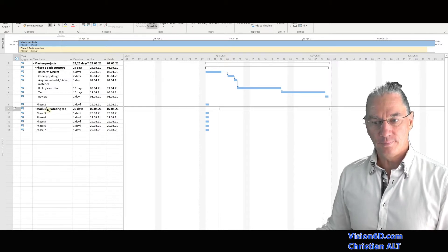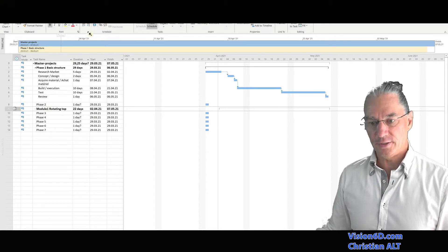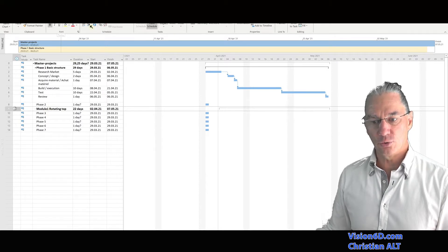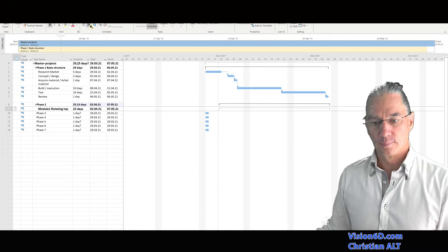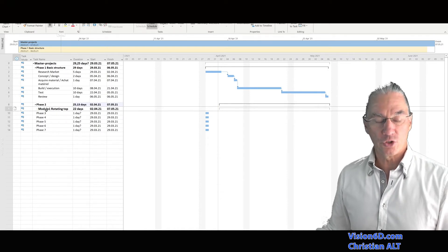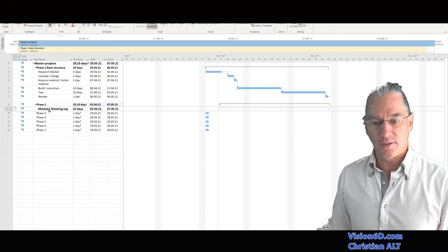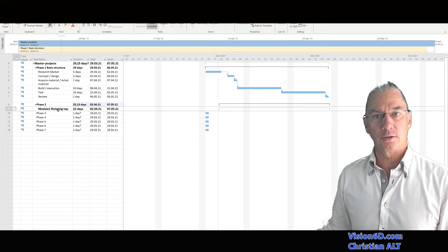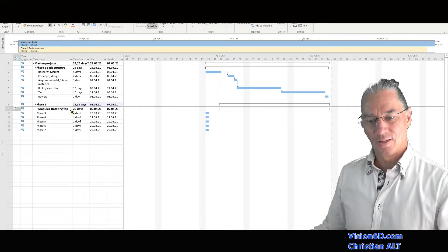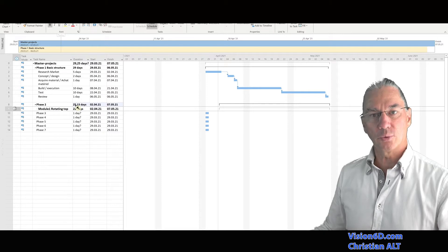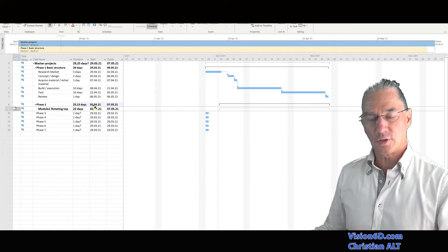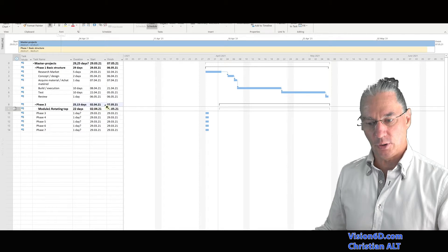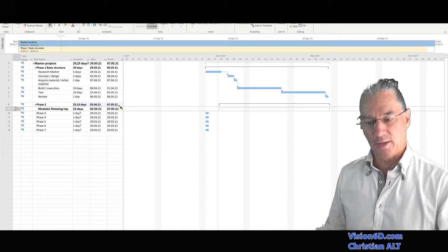For this, I'm going to indent it within phase two. And now we really have a phase two which contains module one rotating top. We see here that phase two is about 25 days and will start the 2nd of April and finish by the 7th of May.